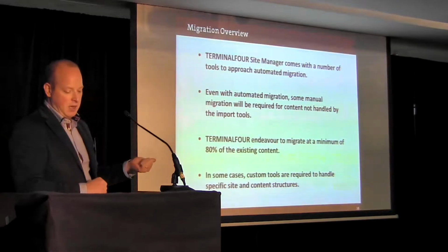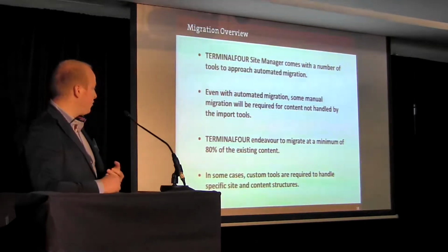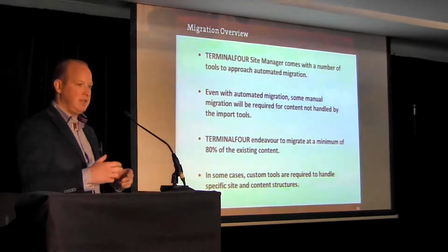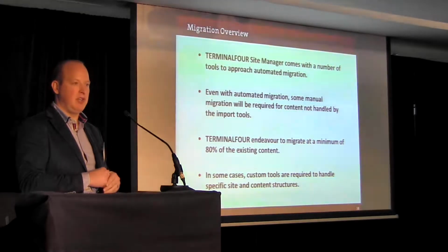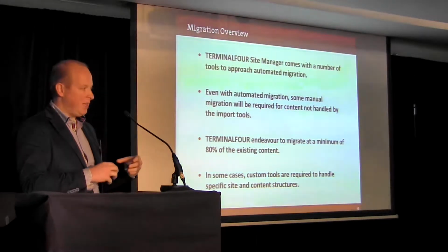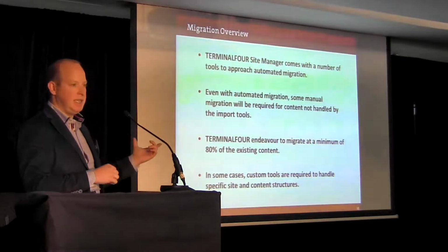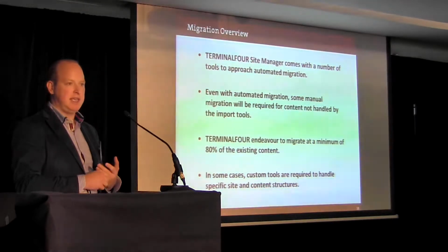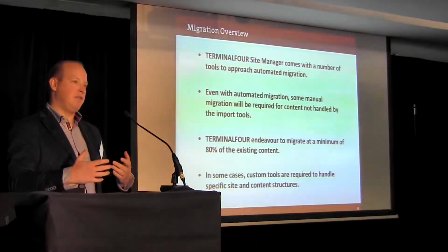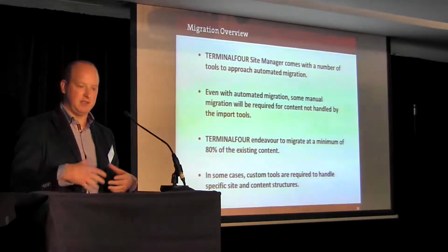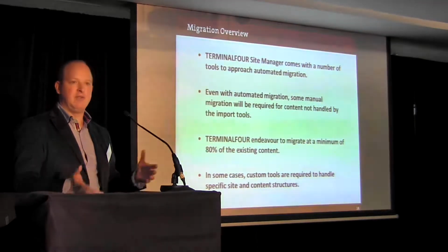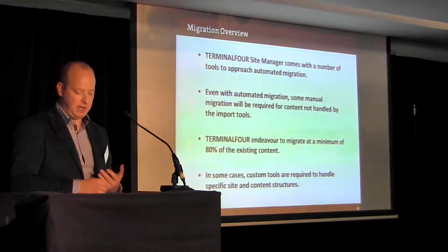Even with auto migration, just to point out that there will be some manual migration, if not a little bit more manual migration, especially around the QA that you're going to need. With the HTML importer, what we generally try to say is that we bring in about 80% of the content. So you have to plan for that. What's going to happen to the other 20? Do you just say, that's great, we've got 80% of it, and move on? It's just something to have a think about.